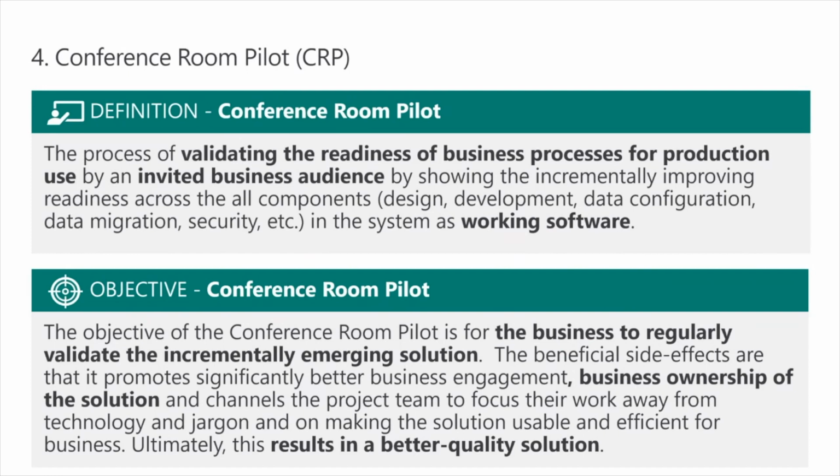the end users, right? This invited business audience is not the people that are seconded from the business to your project, right? These are not SMEs. The invited business audience is your end users. These are the business owners of a given work stream. These are people that do this process day to day in the business, right?